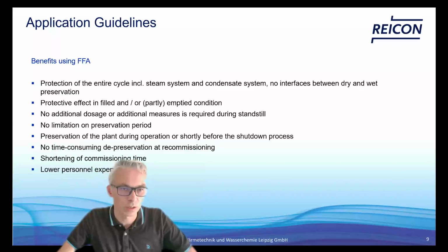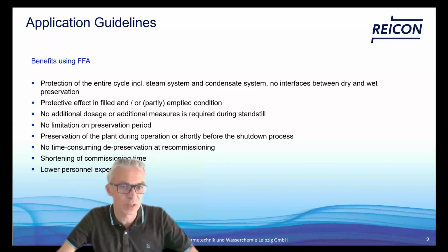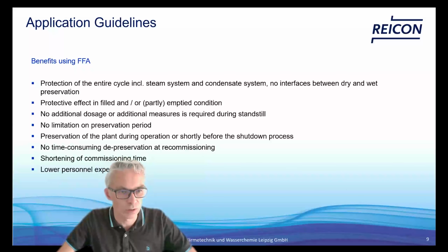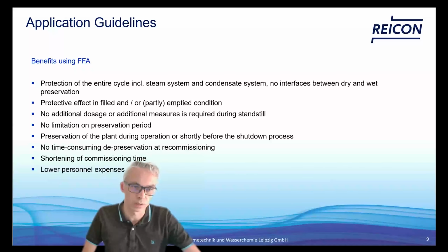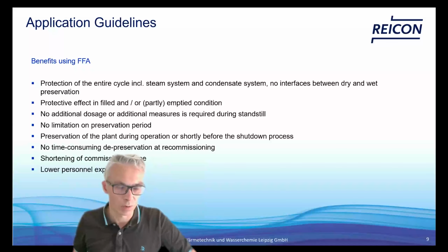The preservation itself is done during operation, shortly before the shutdown process, so there's no additional time necessary to get the system into a safe state. And also there's no deep preservation necessary or actions to do before you restart the system, which will shorten the commissioning time and also lower the personnel expenses, especially for this preservation.